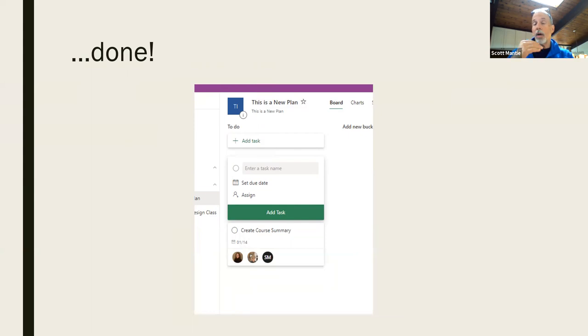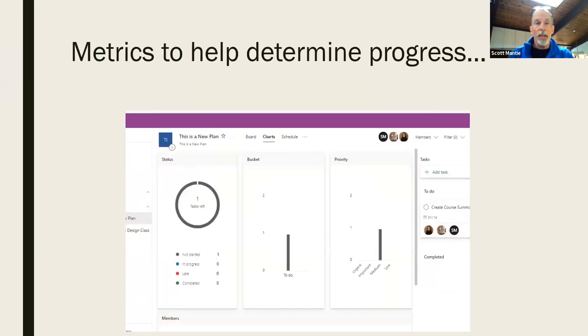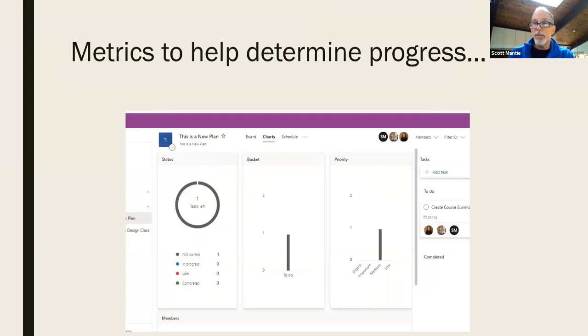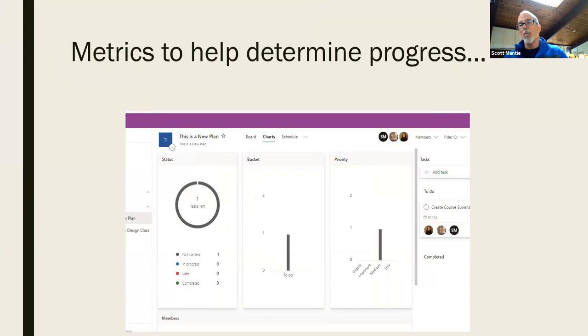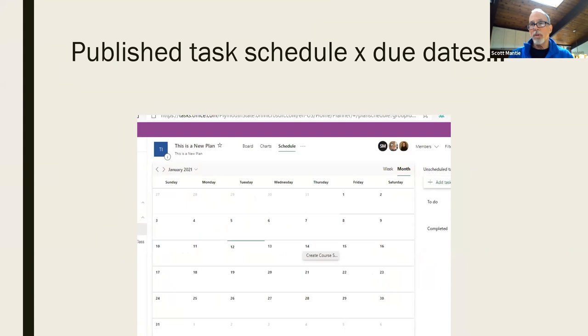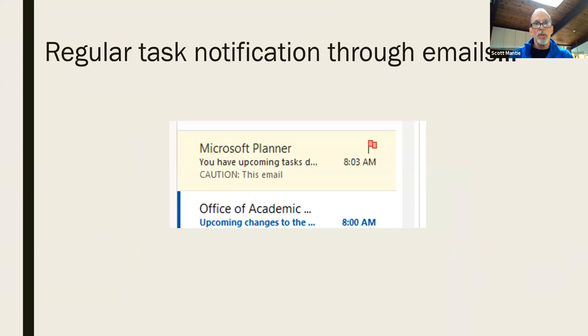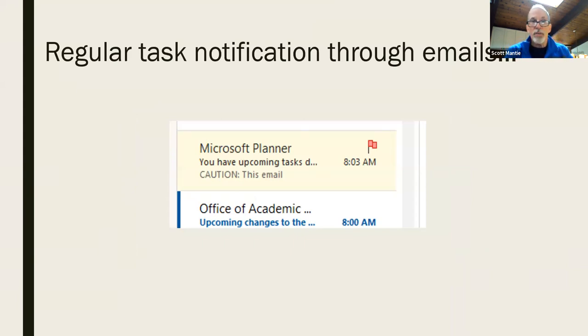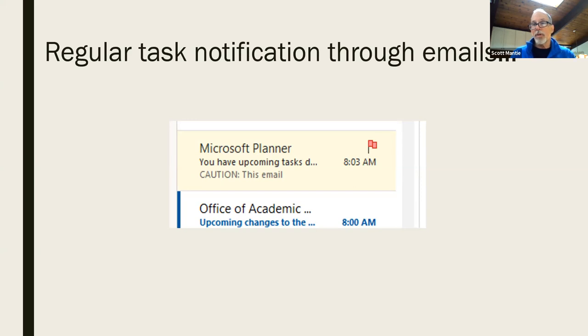Now we can go in and add all these tasks. We can add all these other components, keep making those assignments and seeing where they are going with that. As we progress, we have metrics inside a planner. They are simple metrics, but at least they give us a sense as to where inside of this process. And along with that, we have a schedule that crosses with due dates. So we sense as to how are we doing in the schedule? Are we in a place that we can go ahead and accomplish things or do we need to move things along those lines? Now, on a regular basis, those that have been assigned tasks are sent an email. And here's a case, Microsoft Planner, you have upcoming tasks. So there are notations that go out, information that goes out, sort of keeps the process going.